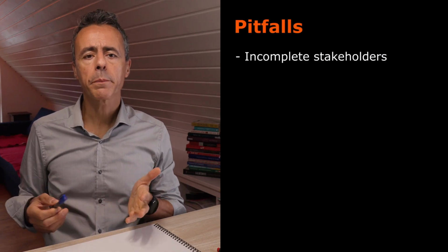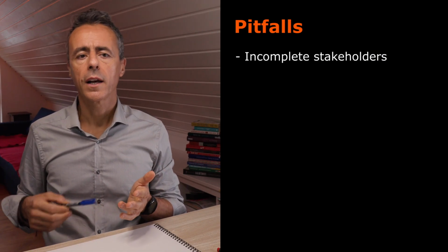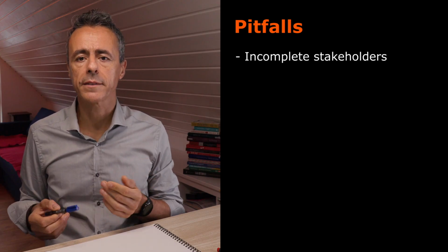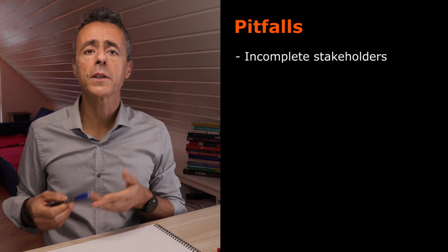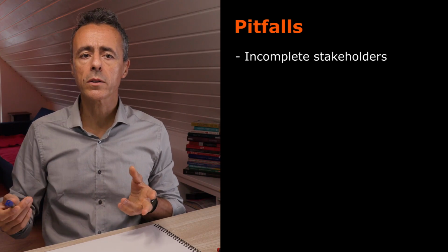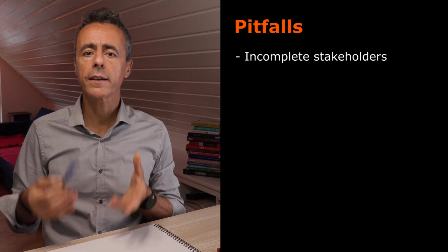Now let's talk about some of the most common pitfalls I see in consulting and assessments, and more important, how to avoid them. Incomplete stakeholder list. Many projects forget key stakeholders, like internal teams or departments. One example, platform development. Create a list of stakeholders at the start and make sure that their needs are captured in the requirements.